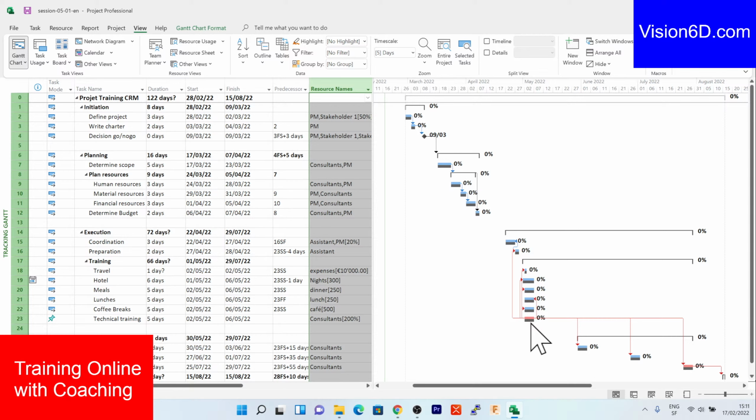And there you have many explanations about the critical path and margins. So we are now at the stage where this project is moving ahead. What you see in the Gantt chart is that we have gray lines and blue lines. Blue lines are what we do and gray lines are what we are supposed to do.